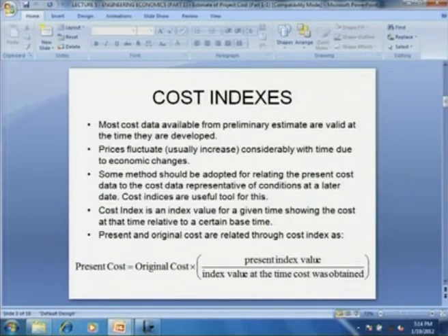Pre-design cost estimates, what we also define as order of magnitude estimates or preliminary estimates, require much less detail than the firm estimate such as definitive or detailed estimate. However, pre-design estimates are extremely important for determining whether a proposed project should be given further consideration or for comparing process alternatives or alternate process designs. And therefore, for this reason, much of the information presented is what we shall see now.